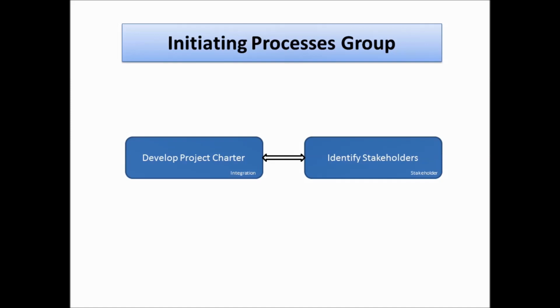So moving on, what is a project charter? A charter is a fairly simple document outlining a few things like project description, the project objectives, the scope of the project, a rough idea of cost and timelines, the various constraints, the high-level risks, and so on and so forth. To put it in simple terms, it's like the birth certificate of why this project exists. This project charter is authorized by someone called a project sponsor, and it basically provides the project manager the authority to apply organizational resources to the project activities.